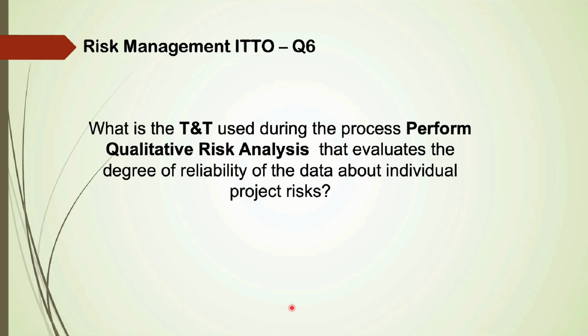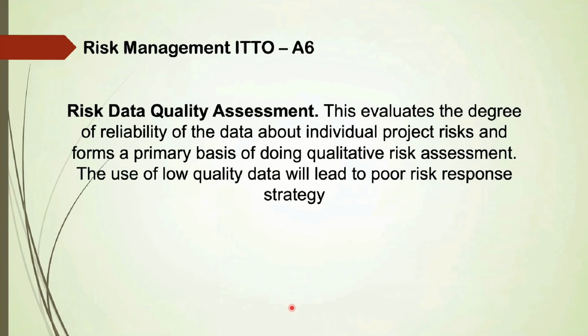Question 6. What is the tool and technique used during the process Perform Qualitative Risk Analysis that evaluates the degree of reliability of the data about individual project risks? Answer: Risk data quality assessment. This evaluates the degree of reliability of the data about individual project risks and forms a primary basis of doing qualitative risk assessment. The use of low quality data will lead to poor risk response strategy.